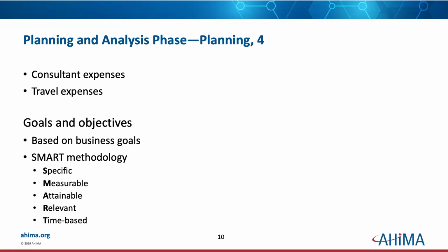You need to know consultant expenses and travel expenses. Because guess what? Those two add up very quickly. Now, consultant expenses and travel expenses, those can be somewhat minimized by making sure you're well prepared when you have a consultant that you're going to work with to keep their time to a minimum. And also, in this COVID environment we're in, many are not traveling.